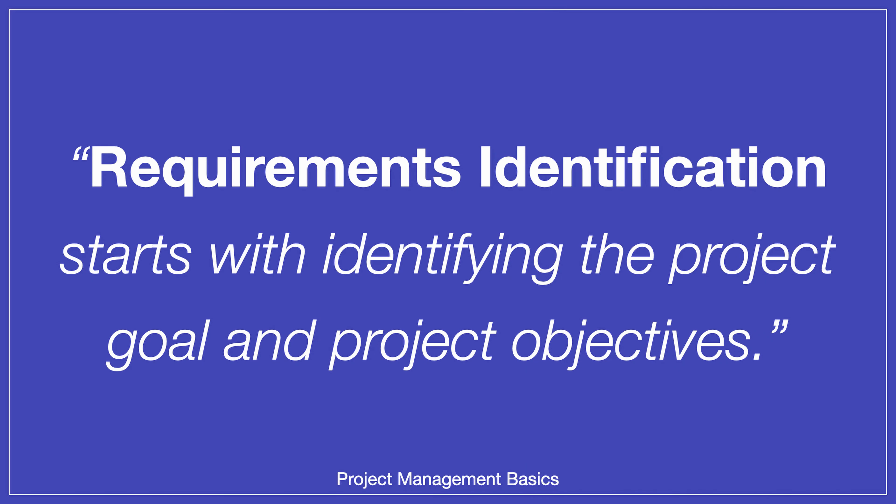All requirements identification starts with identifying the project goal and project objectives. Because all requirements that you collect and specify should help you to achieve one of the project objectives. If a requirement doesn't help you to achieve the project goal, you should try to avoid it and remove it from the scope of this project.